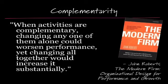And I think a good example, and a relevant example for this conversation, is agile software development. You've got a lot of practices, things like iterative development and iterations and test-driven development, continuous integration, all those kinds of things. And you'll often find in organizations that are doing things in a more traditional way, what we call the waterfall way, that if you try to pick some random practices from Agile, that sounds like a good idea, let's try doing test-driven development and bolt it into our existing process, you often don't get the full benefits. And in some cases, it can even make things worse, and you end up duplicating.